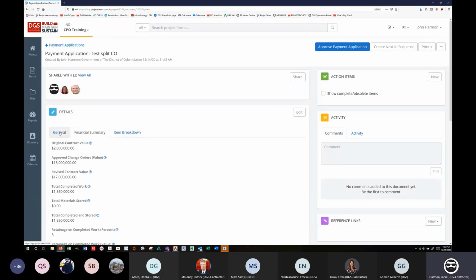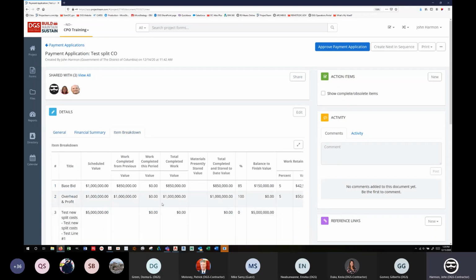You're not changing anything here, but you're reviewing all of this, and only once all of that is correct and has been dealt with, that's when you should be approving this and then sending the action item over to the vendor saying, run the merge template, create your invoice packet, and upload to the DC vendor portal.